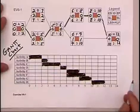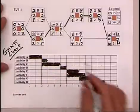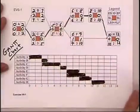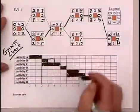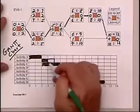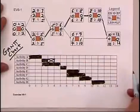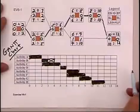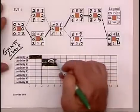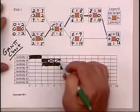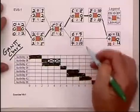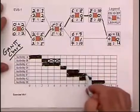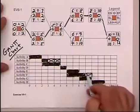For example, B has one day of slack, and typically you indicate it like that. Sometimes you can put an X at it if you want to indicate slack. Just be consistent. We actually have two days of slack, so we put two X's there, and we also have slack with F. We put our X there.